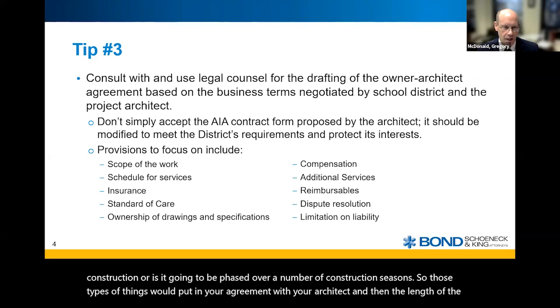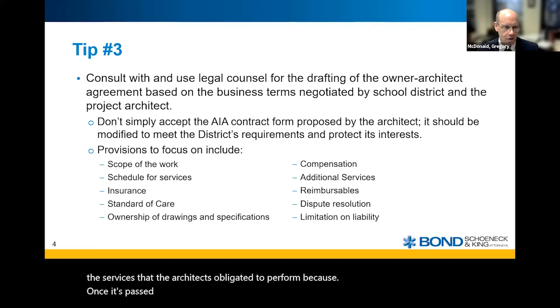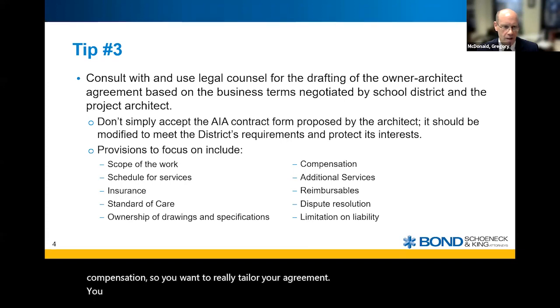that the architect is obligated to perform, because once it's past that date, your architect is going to be looking for additional services compensation. So you want to really tailor your agreement with a realistic schedule, so that you're buying up front those services and not having to pay additional services.